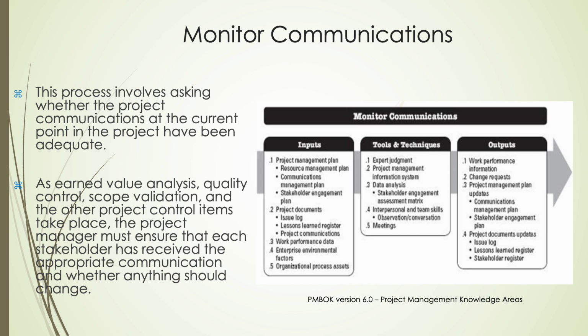Monitoring communications involves ensuring that the information needs of project stakeholders are met throughout the project lifecycle. This process relies on key inputs such as the project management plan, project documents like the issue log and lessons learned register, and work performance data. Tools and techniques like expert judgment, data analysis, and interpersonal skills such as observation and conversation are essential for evaluating how communications are performing and whether adjustments are needed.